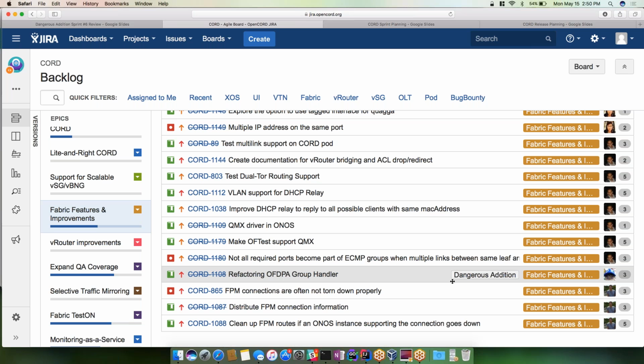So usually, whoever used to do this earlier used to close out the previous sprint, then things would fall into the backlog, and then open the new sprint where you could move things manually, right? I normally do that, except we needed the new sprint in order to try to do the review and the planning in the same day. Oh, I see. Okay.